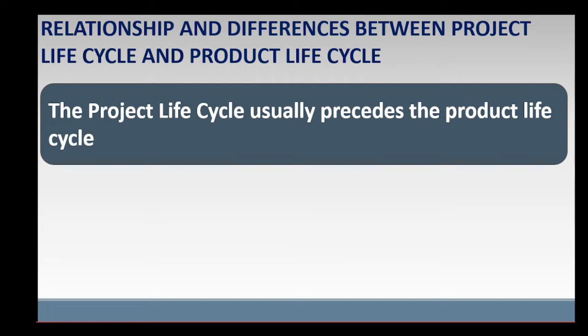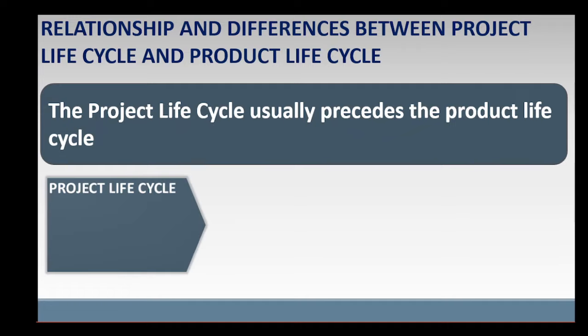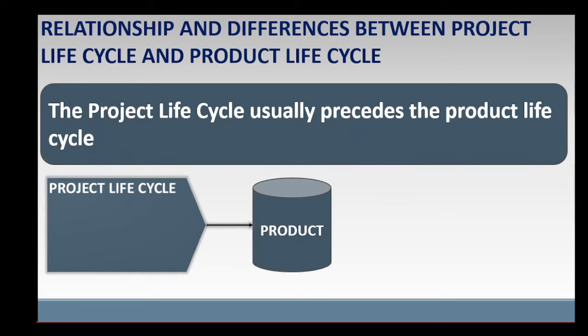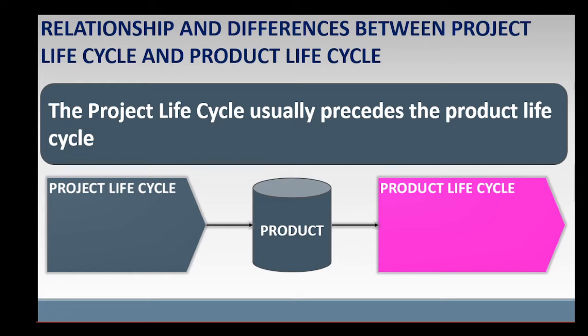So, what are the relationships and differences between project life cycle and product life cycle? The project life cycle usually precedes the product life cycle. That is, a project is first undertaken to create or develop the product, and the project ends before the product life cycle can begin with the introduction of the product. For example, a project must first be undertaken to design and create a product such as a new car, smartphone, or software before the product can be introduced to the market.